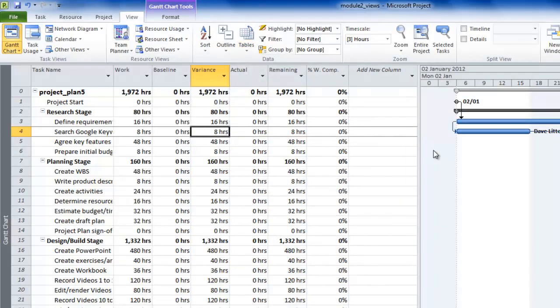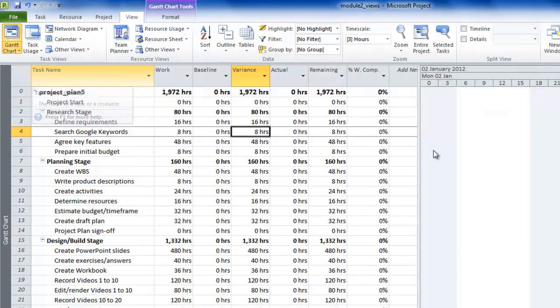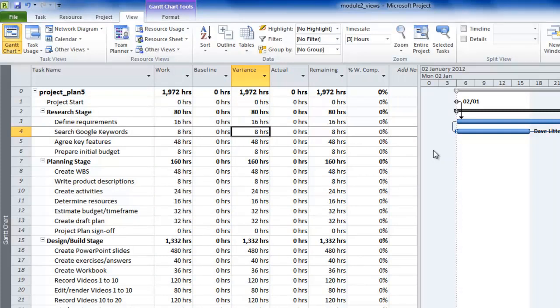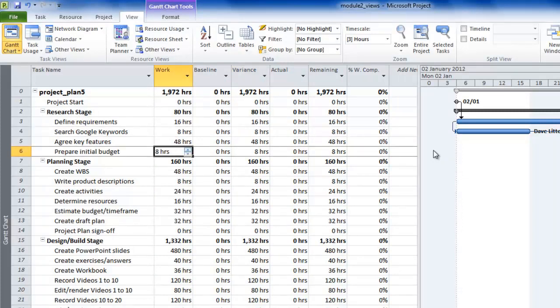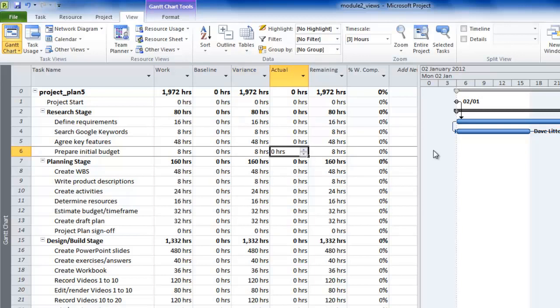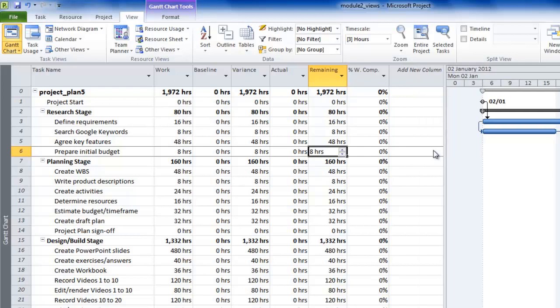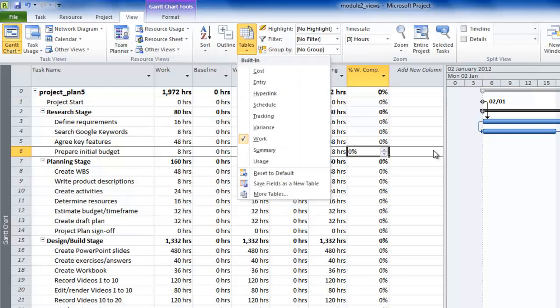Look at a couple more. Let's look at the work table. In a similar way, you've got the name of the task, the total work hours on each task. Again, once you save the baseline you'll have the baseline hours, the variance from the baseline, the actual hours, and remaining hours. A useful field is showing the percentage work complete. Just a quick point which we'll cover when we're doing tracking: there could well be a difference between a task being say 50% duration complete, but the percentage work complete could be say 60% or 30% or some other number. So this percentage work complete field is distinct from duration percentage.